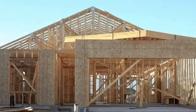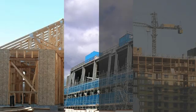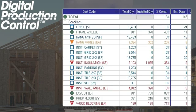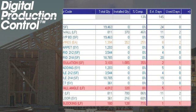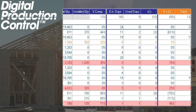Whether your project is small, medium, or large, Digital Production Control gives you the power to recognize labor production problems instantly rather than at the end of the job where overruns can be more costly.